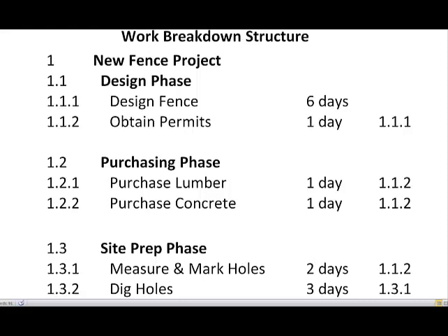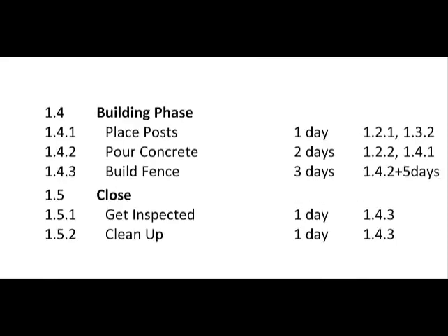Moving on to the purchasing phase, which is 1.2, we have purchase lumber and purchase concrete. You can see why purchasing doesn't fit with designing. Finally, we have the site prep phase, or at least finally for this screen. We have the site prep phase, and this is getting ready for the fence. This is 1.3, and under it is measure and mark holes and dig holes.